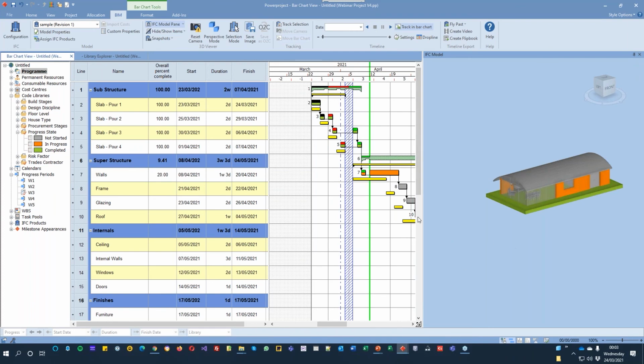So you have all of that control inside there. It doesn't matter how many revisions you get, you can do that. The only time the links are impacted is if they've actually deleted objects from the model and redrawn them, so they're no longer the same object. That will be a challenge on that side of it. And then it's a case of, as you see, just simply progressing and working through that side of it.